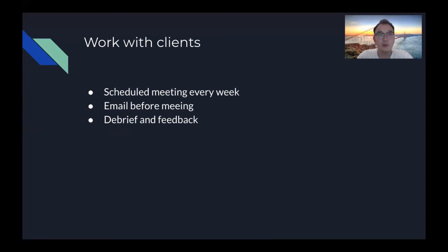Every Friday, 12 to 1 p.m. is the scheduled meeting with the clients, where we use a presentation to show what has been done for the past week, hear the comments from them, and decide what will be done before the next meeting. Before the meeting, there will be an email sent to the client, debriefing the major updates on the project. By this continuous interaction with the client, the group was able to move forward and improve different aspects of the project. For instance, for the first demo, the client said there should be more testing for the project, and we did the testing a few weeks later.